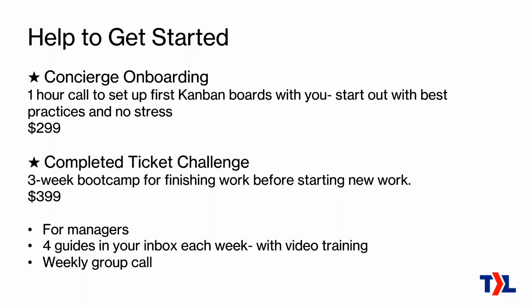We also offer what we call the Completed Ticket Challenge, a 3-week boot camp. It emphasizes finishing work before starting new work, so you can maintain low work in progress. A lot of MSPs have engineers with 10 or 20 or 30 things on the go, and that's very difficult. If you assign something new to an engineer, you've got no idea when it's going to be done when they have that much on the go at once. If you can get that down to 1 or 2 or 3, they are less stressed and you have more certainty about when things can be done. Your customer also sees that when a ticket is started, it's finished fairly quickly. So it's just better for everybody. But it can be confusing to know how to actually do that, so that's why we laid out this challenge.